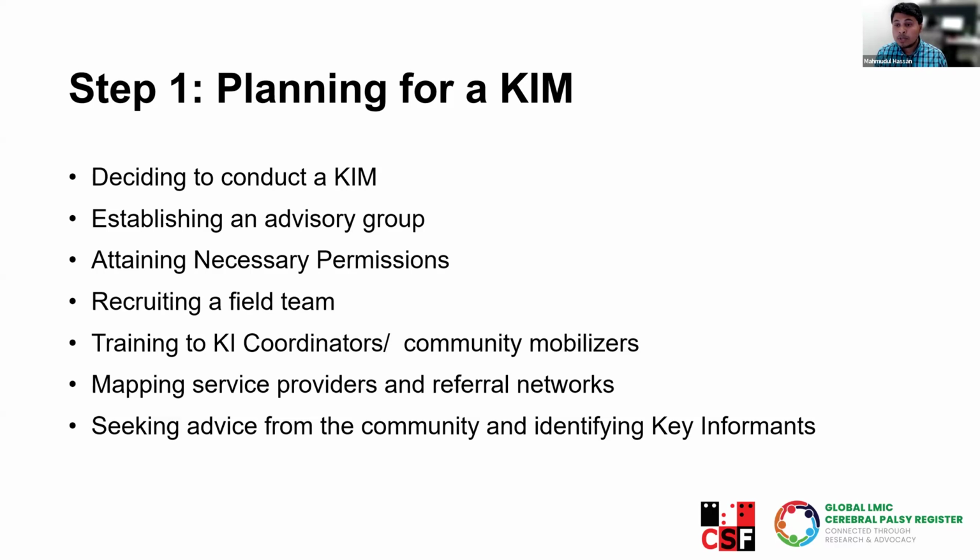Then we'll have to recruit the field team. The success of a team depends on a dedicated full-time team. We'll need a full-time project manager and a number of KI coordinators or community mobilizers. The exact number of community mobilizers will depend on the size of the team. Then we'll have to train the community mobilizers on the purpose of this scheme, how to organize the assessment camp, and how to train the key informants, etc.